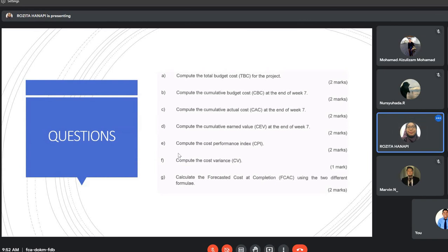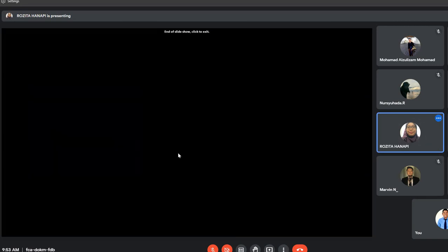So the work with earned value of 89,500 still needs to be performed to complete the project. So the method results in the FCAC of 992,500. Okay. Done.